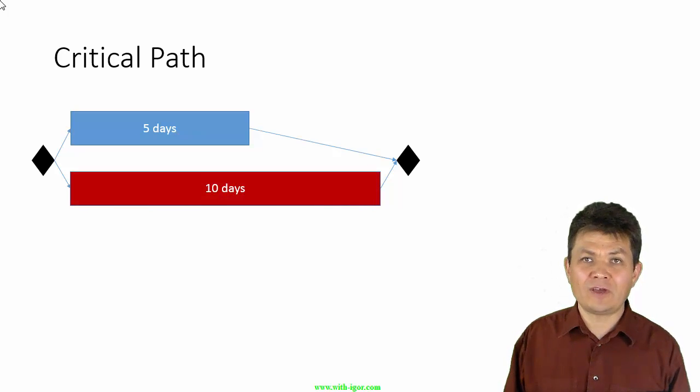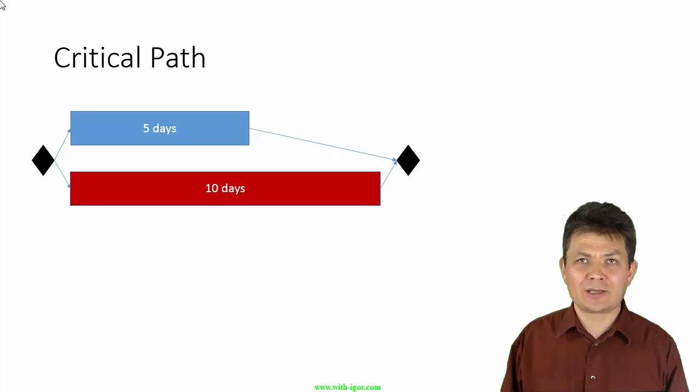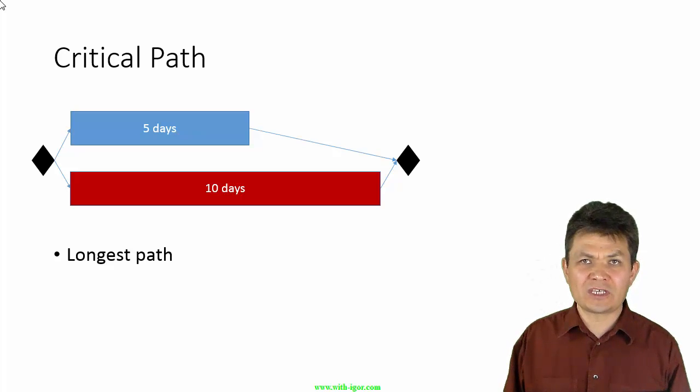Well, the 10 days path is the critical path. So, the critical path is basically the longest path through the schedule.